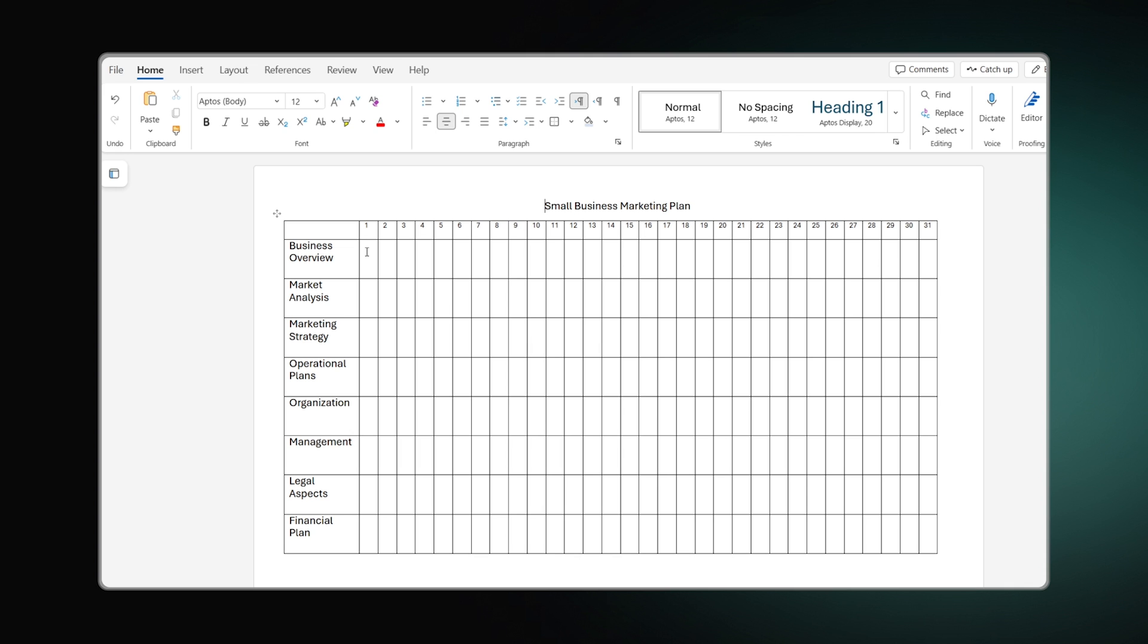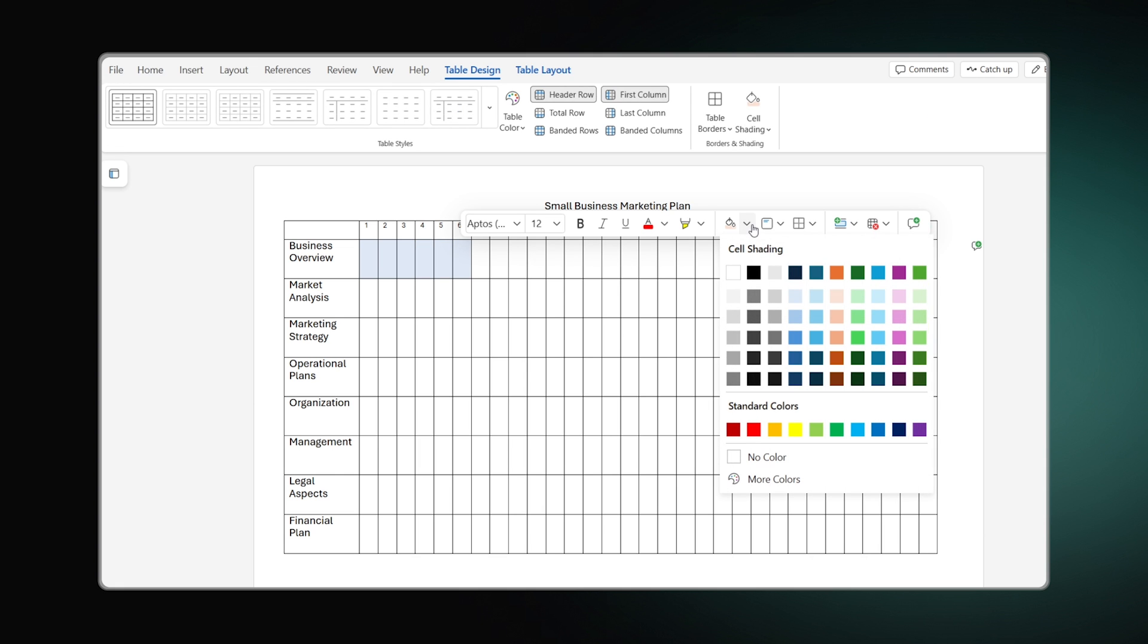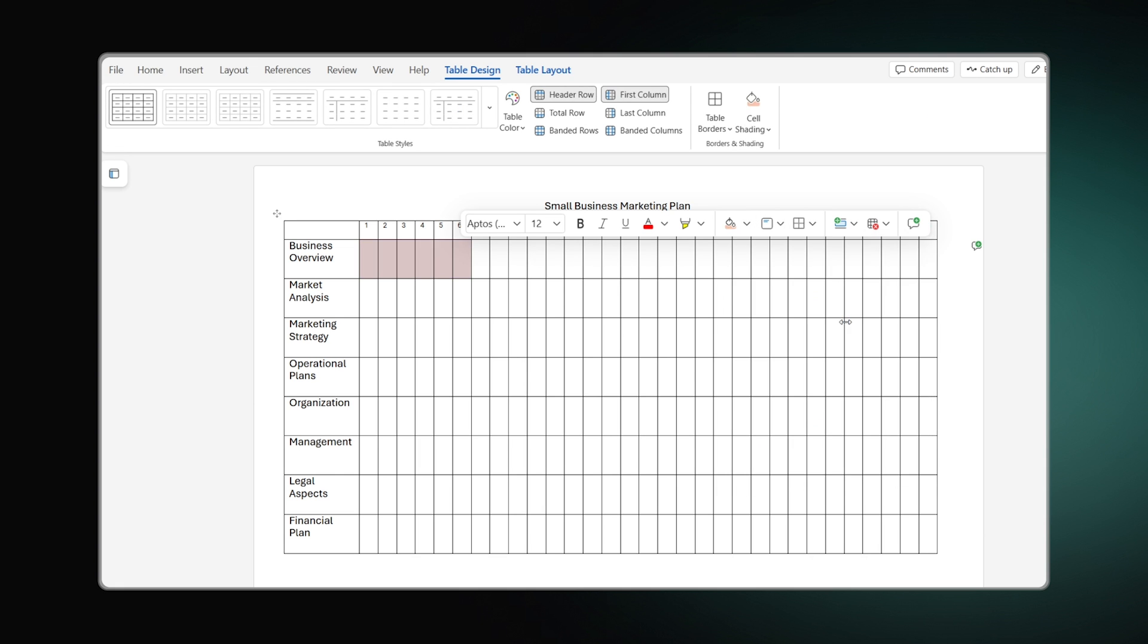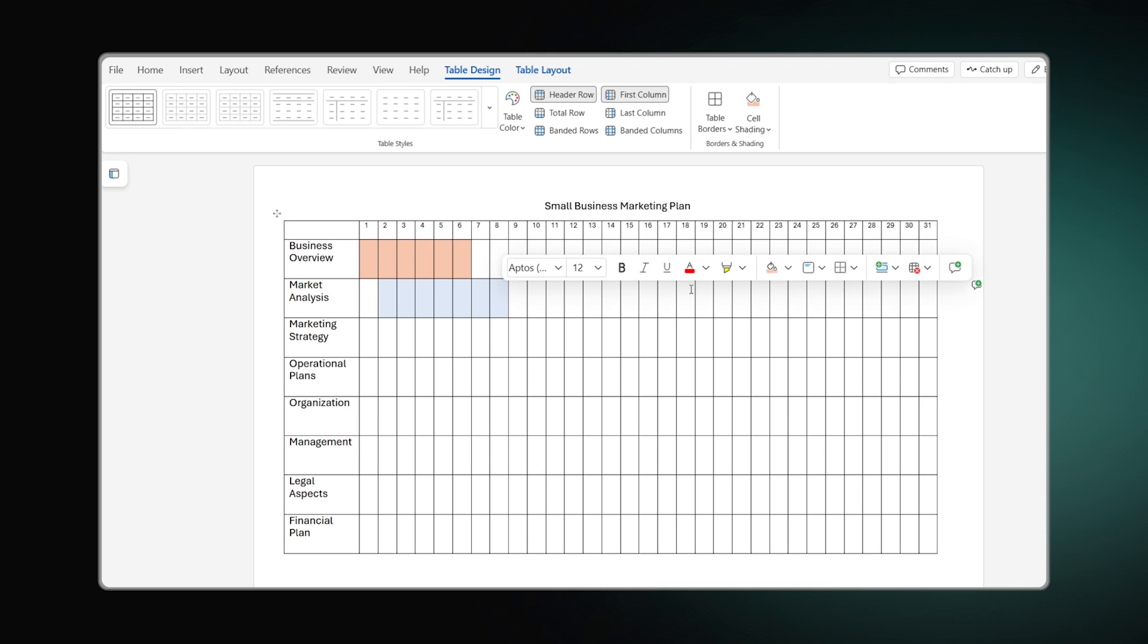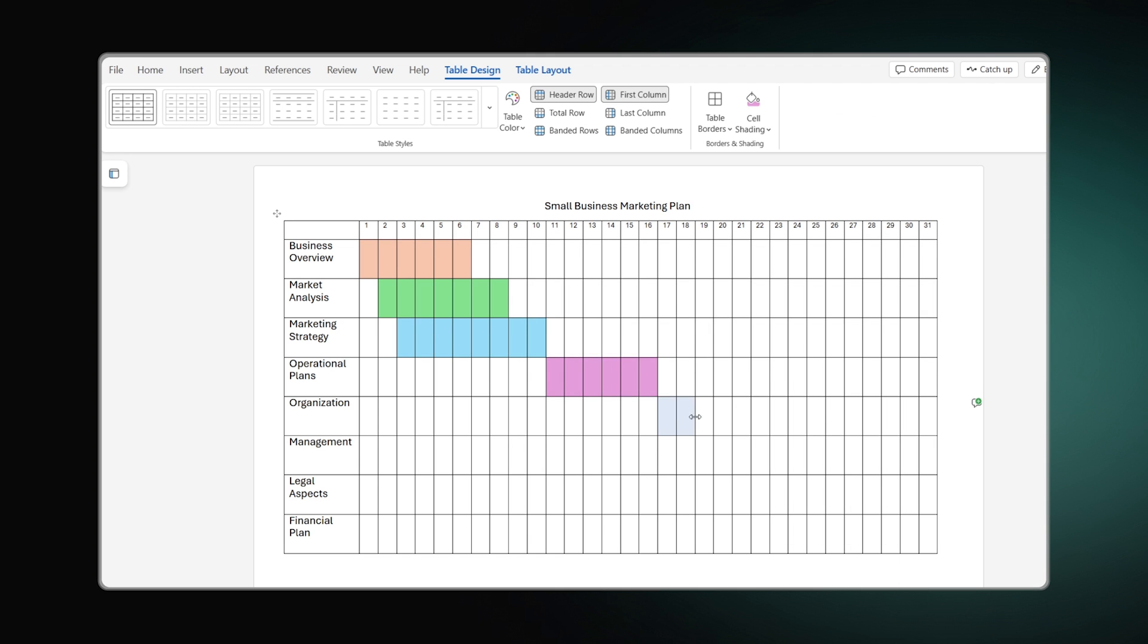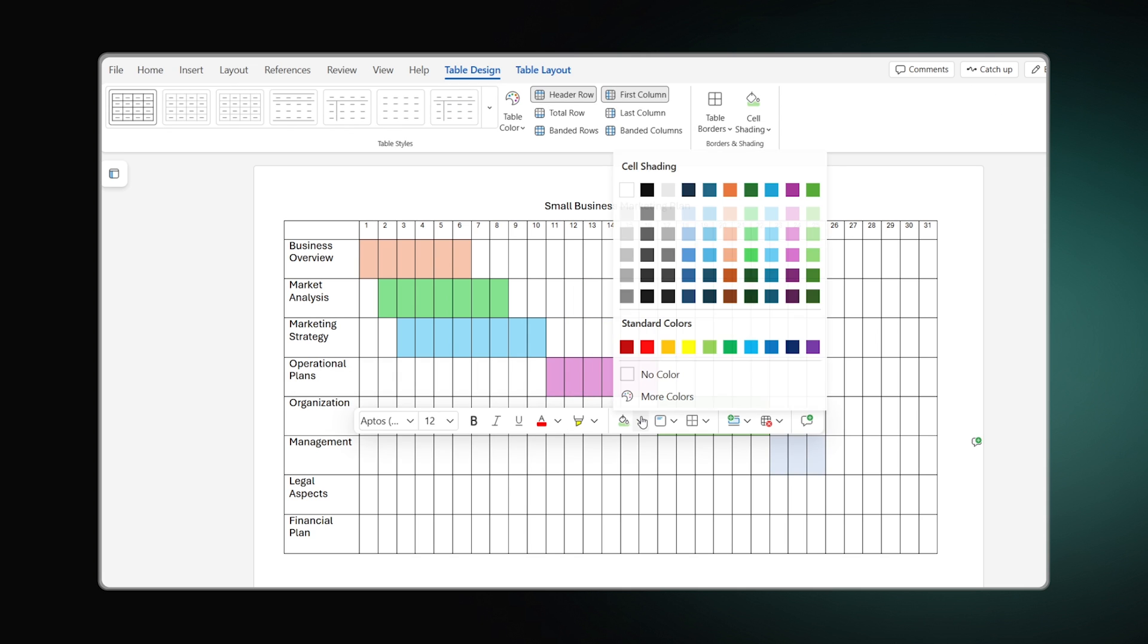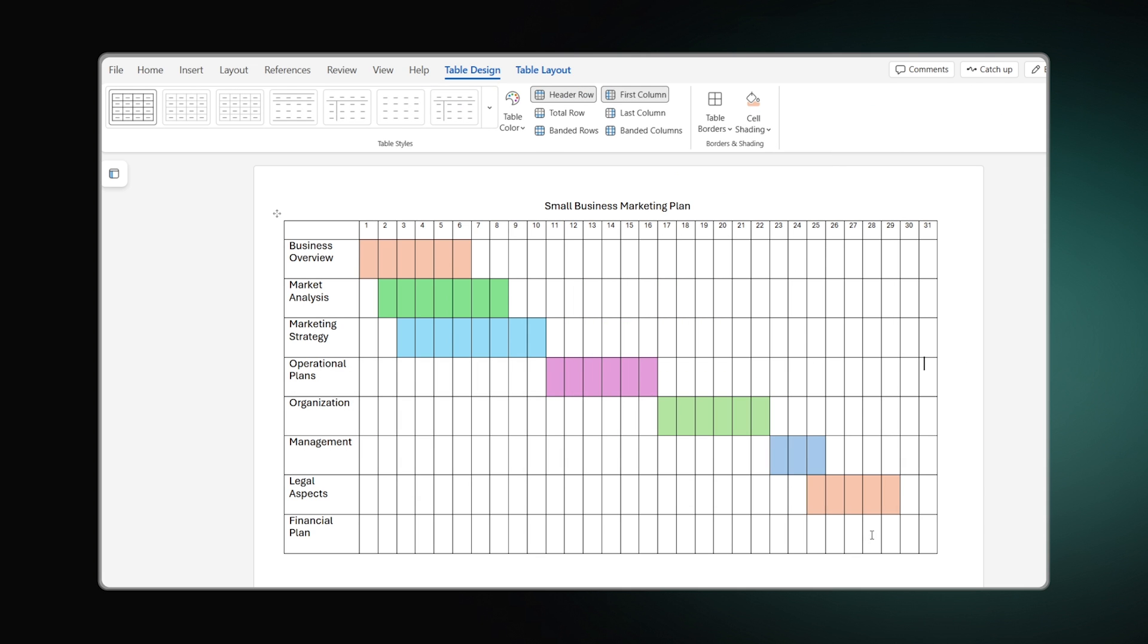For example, I intend to spend 6 days on business overview activities. That's why I select 6 cells and highlight them to illustrate the amount of time. You can go further and do the same with each task, choosing various colors to differentiate them. The result will look like this.